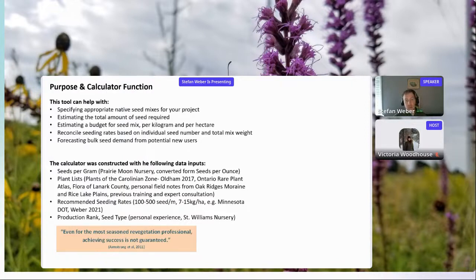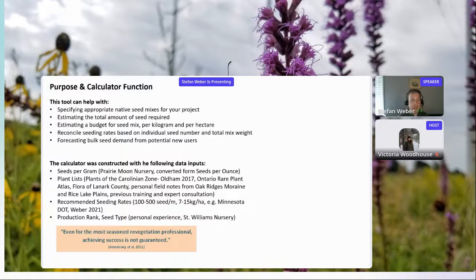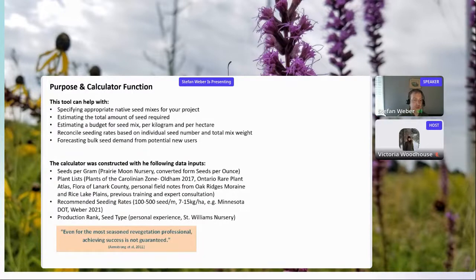We'll be talking about different seeding rates and how to arrive at them. Different sources and experts use different approaches — a seed density approach or a seed weight approach. Typically you're looking at about 100 to 500 seeds per meter or about 7 to 15 kilograms per hectare. There's also a term I've used called 'production rank,' which helps folks understand which species are generally most readily available — how easy they are to produce and how likely you are to be able to purchase larger quantities for restoration.